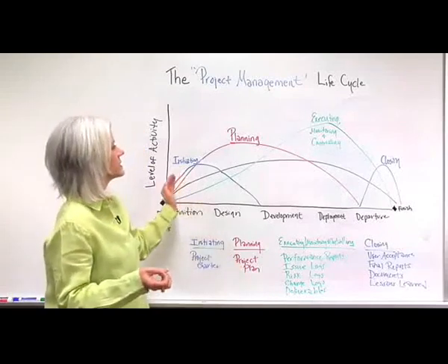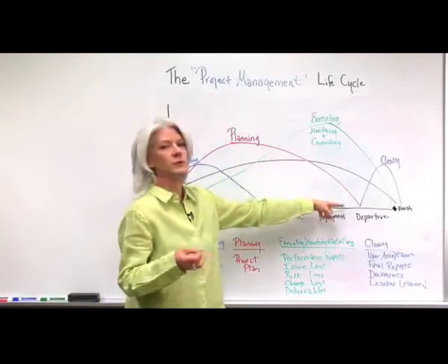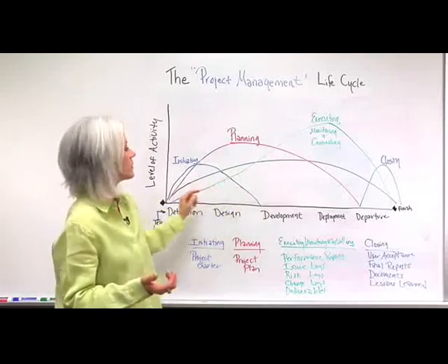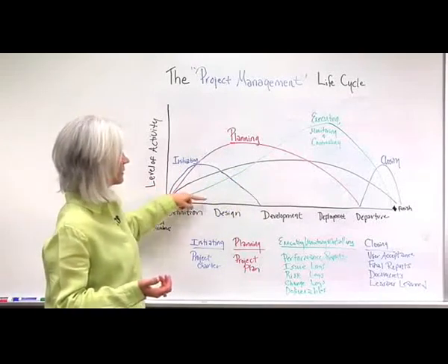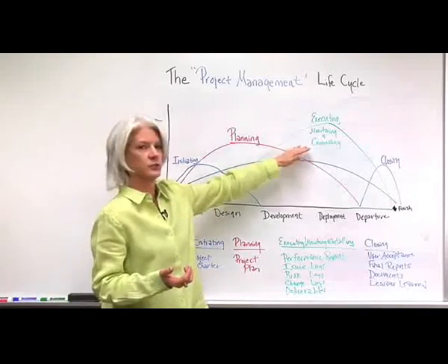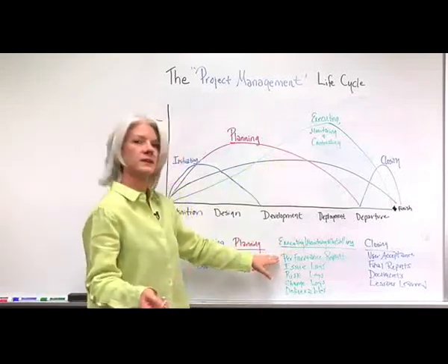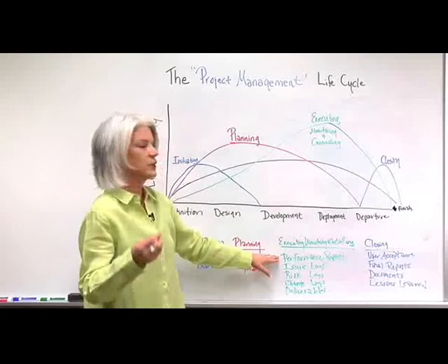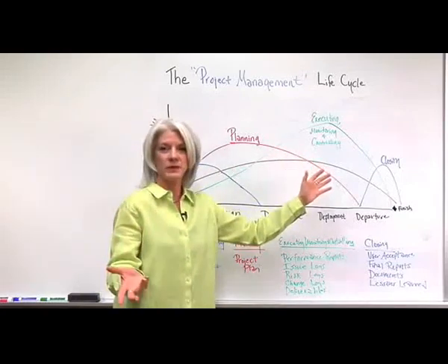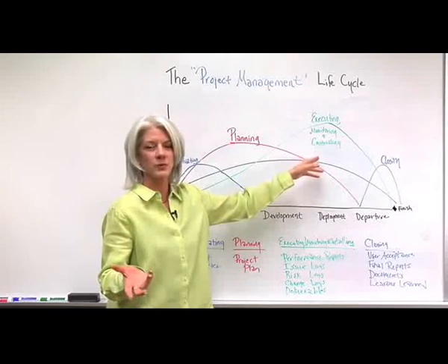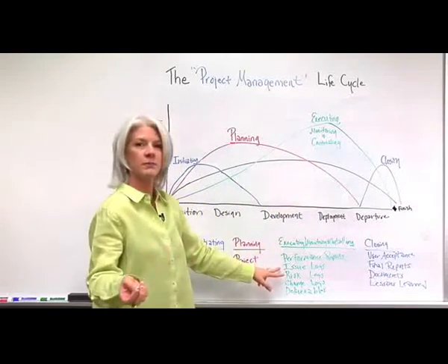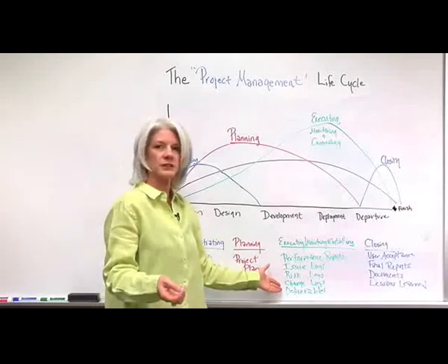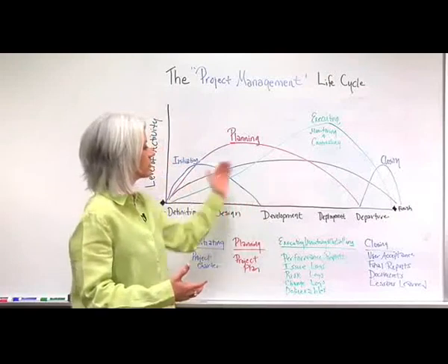in that project. And so the planning continues throughout the project through the departure, and then also the executing, monitoring, and controlling of the project begins. So you can see as the delivery starts, the executing, monitoring, and controlling. So what's going on there? So there you as the project manager, you're producing the performance reports for the project. You're gauging where are we now and where should we be, and what are the things that we have to do to control the project to get it back on track. You're also managing issue logs, risk logs, change logs, and also monitoring the deliverables being produced from the project.